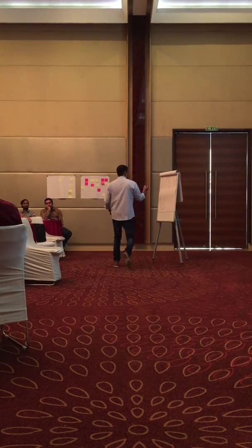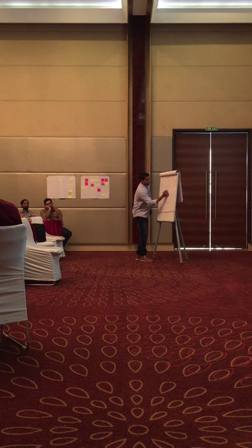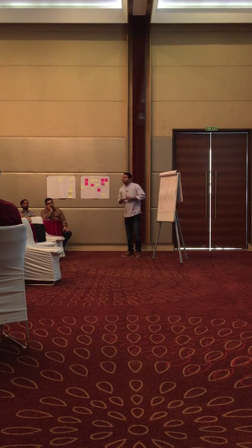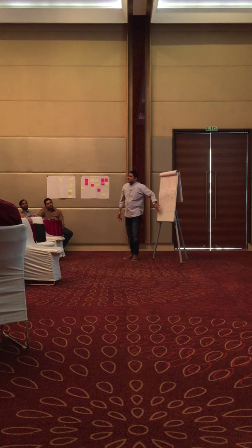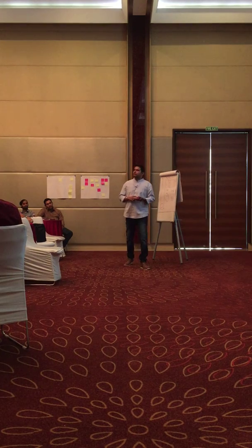So when you say business value is $100, and the size is, say, 5 points, we know what the point is, 5 story points. Another story, $100, which has 3 points. Which one should be picked? The 3 points. Why? Again, same thing, value. The business value is the same, and it can be delivered faster. Similarly, you may have the same size, same value, all these things, you have to collaborate in your discipline. What is the Agile Manifesto's first value?